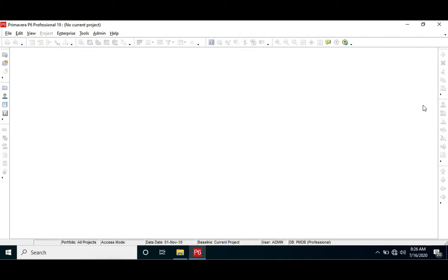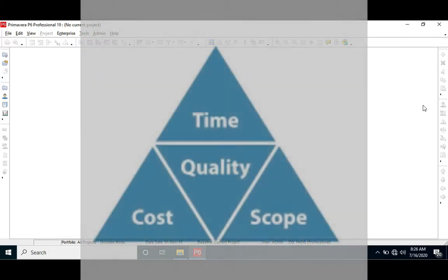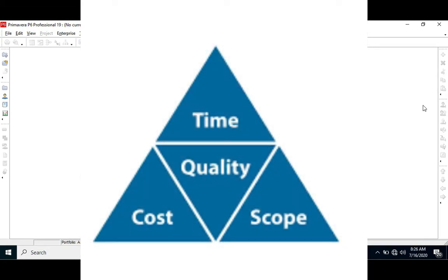In project management, theory suggests that projects, whatever their purpose, goal, or type, are typically constrained by three key elements: scope, time, and cost. The triple constraint model is one name used to describe these elements. Scope is the goals and the results required to fulfill a project. Time refers to the schedule of the project, and cost is the budget, the financial